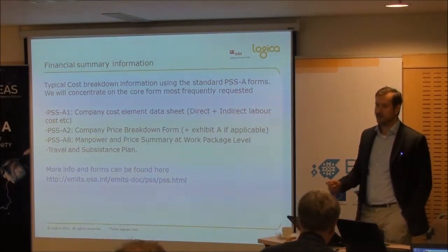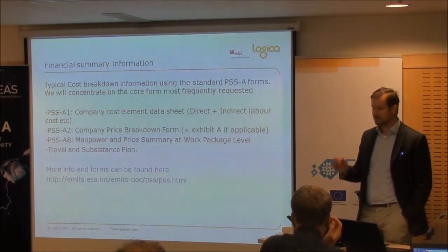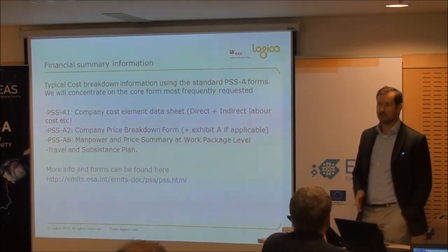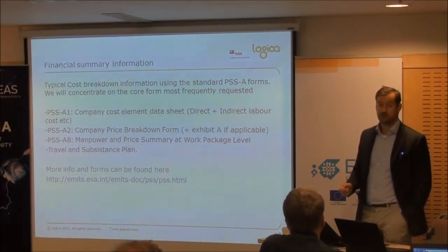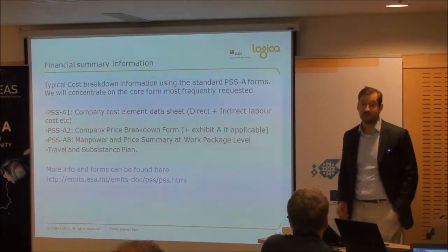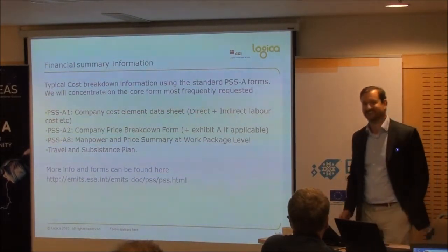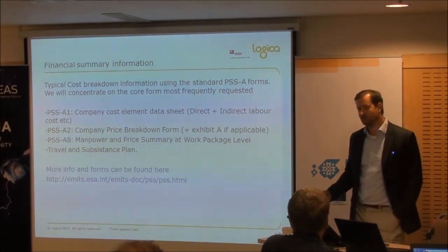in so much as that if it fails to get there, if you do it in less than 5 days, you may have a challenge on your hands, because that's their rule. So if they say in the ITT, okay, you've got 5 days prior to submission, if you're going to use shipping, then you must. If you fail to do that, you run a risk. If it doesn't get there and you say, oh, I only gave 2 days, it depends how well you can negotiate that. But typically, they could rule you out for that.